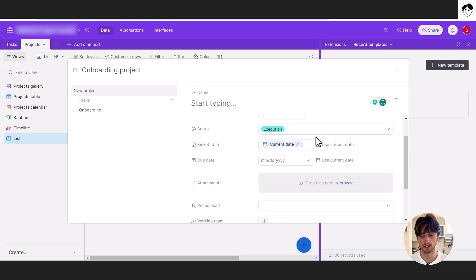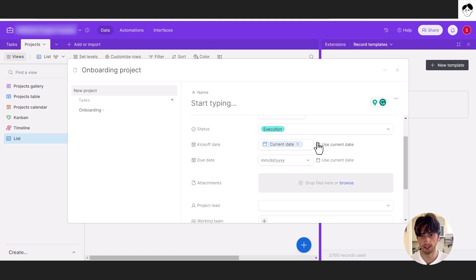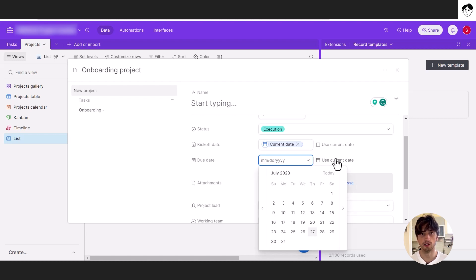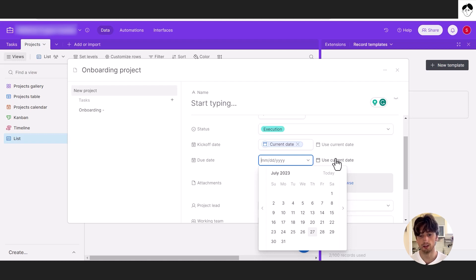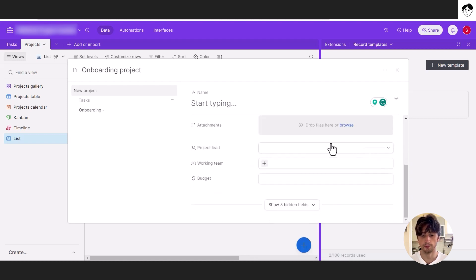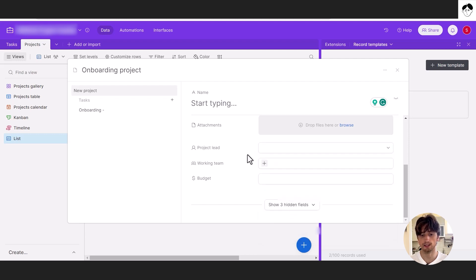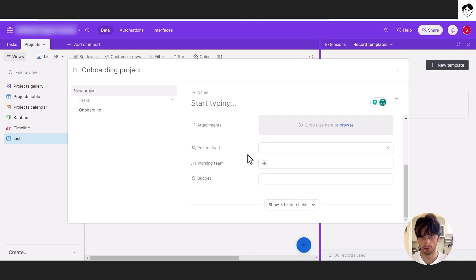The kickoff date can be the current date, if you want, meaning the date when this record gets created. The due date, this one as well can be current date, that's as dynamic as it gets. You can't really calculate dynamic dates from record templates in Airtable yet. The only dynamic date that you can use is the current date. And you can also select people from here, such as current user, that is a dynamic field populated for you as well, based on the user who created that record.